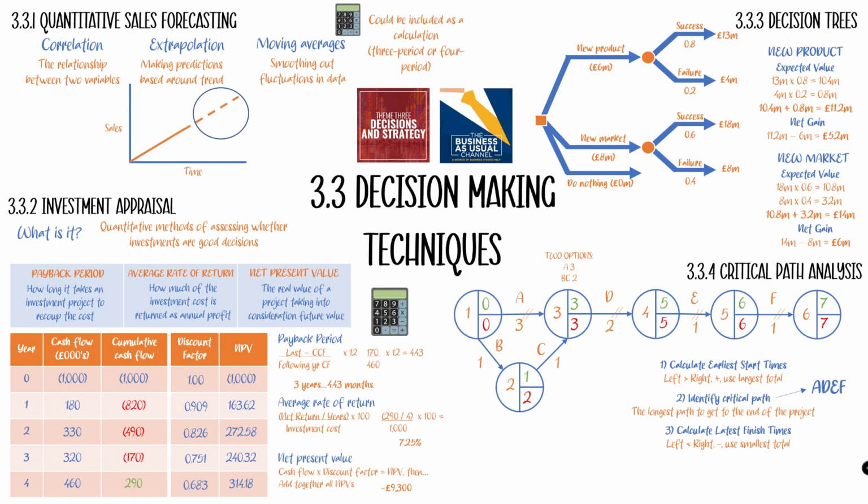Now, the trick here, or the hint, I guess, is that all of the nodes on the critical path, which in this situation are nodes 1, 3, 4, 5, and 6, will have the same earliest start time and latest finish time, because there's no delaying any of these. They've got to be right on time. Whereas node 2 isn't on the critical path, so there is going to be a difference between the earliest start time and the latest finish time in that node.